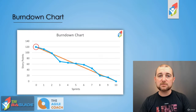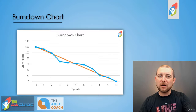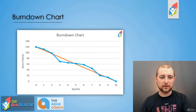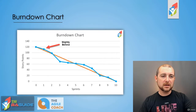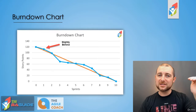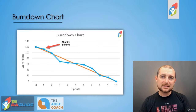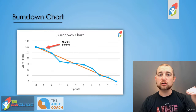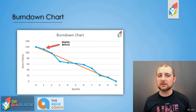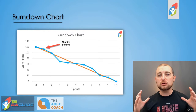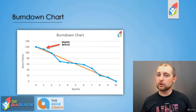As we move into sprint one, you can see that we fell behind a little bit. We were slightly behind because the number of points we completed was actually less than what our trend was showing. This happens a lot on teams, especially new teams.